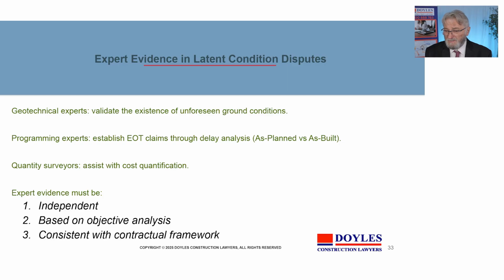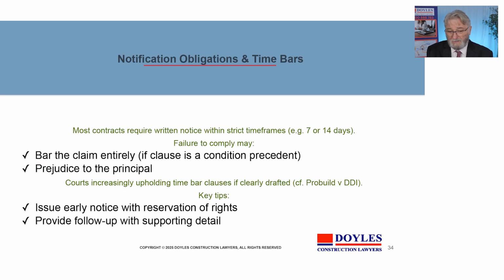You want it based on an objective analysis. An expert to be accepted in court must actually show his reasoning to get to the result. Otherwise, it won't be accepted. I was involved in a matter where, luckily, the other side fell into the trap. Their expert had a wonderful report, inches thick, and was prepared to stand in the box and support it. But the problem was that all of the facts that he assumed hadn't been proved by other witnesses, and his whole case fell down. So you've got to make sure that it's based on objective analysis, facts that are proved, and it's consistent with the contractual framework. If you're not coming within the clause of the contract, the concern is that you might not recover.